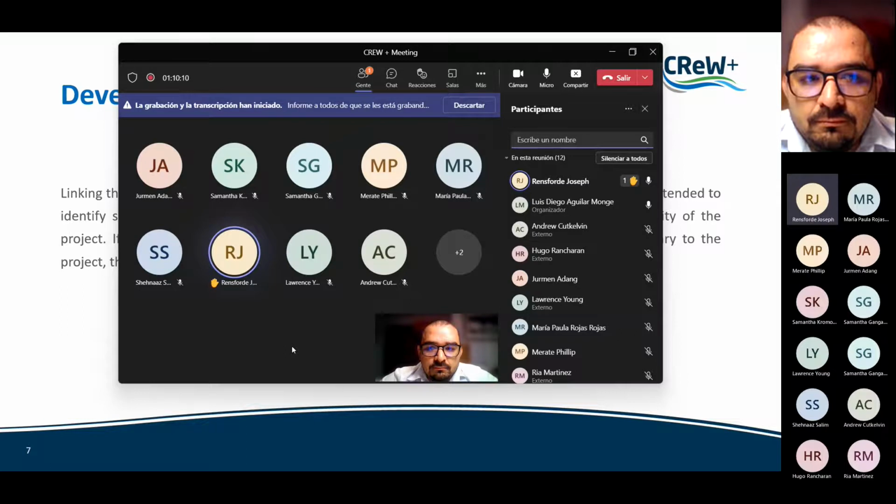And it will affect in several ways, more importantly as related to approval and funding, especially if this funding is going to come from government or from an international donor through the government. If that project is not aligned with the government developmental plan, then you are not likely to receive any funding for it.